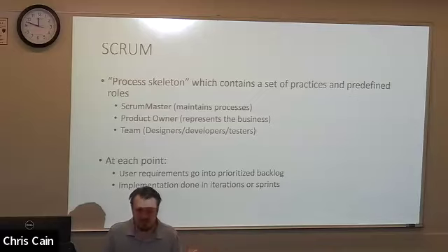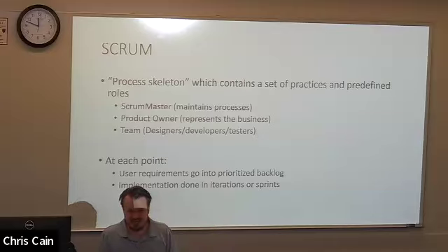We have a Scrum Master. The Scrum Master's job is to make sure that we're on track for this meeting to take 15 minutes or less. So if we start getting sidetracked, the Scrum Master will say sidebar, and that just stops that conversation. Says it's important, talk about it after this meeting. Something of the sort. Say, all right, next, who's doing what? So keeping it on task, keeping it efficient.